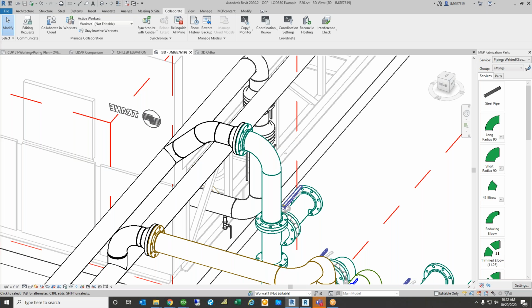Frequently, owners believe that if they get a 3D Navisworks model from the contractor at the end of the project, that's their as-built, that it is the same thing as as-building their model. It's not like in the past where, as an engineer, I could hand off a set of CAD files to the contractor. The contractor's detailers can go in there and modify the CAD files and kick them back over, and boom, there you've got as-built.